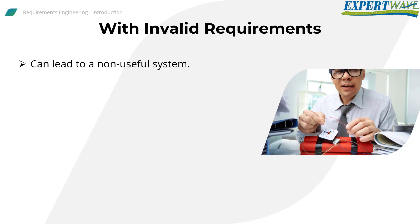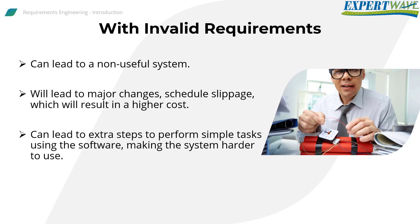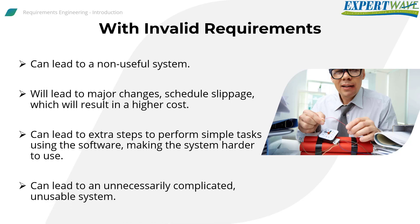Late requirements will lead to major changes, which will lead to schedule slippage, where more time is wasted trying to merge the new changes, resulting in a higher cost. Invalid requirements can also lead to extra steps to perform simple software tasks, making the system harder to use. Unnecessary requirements lead to an unnecessarily complicated, unusable system. When users feel frustrated by using the software, they will drop it and never use it again.